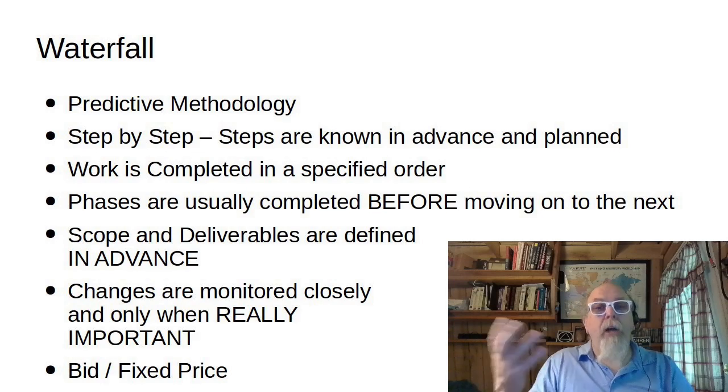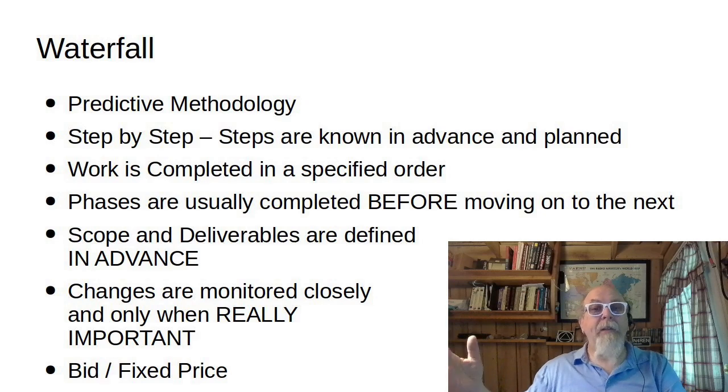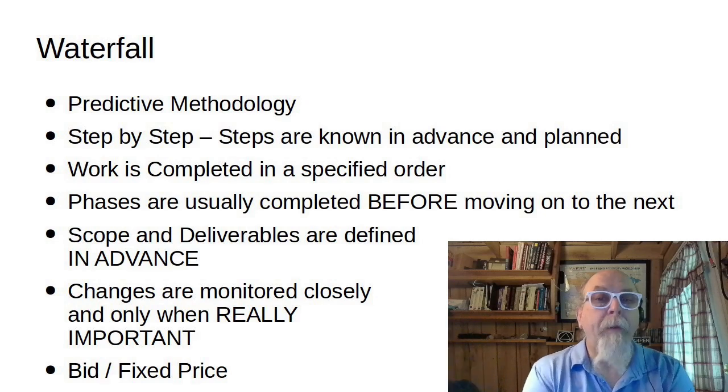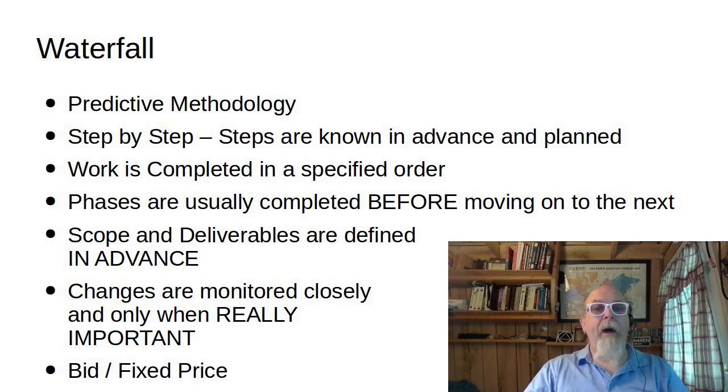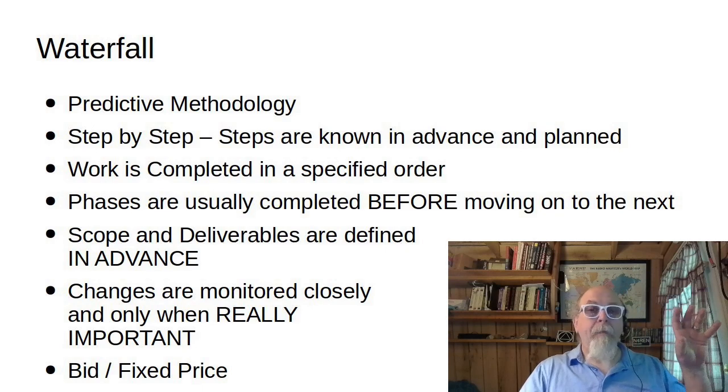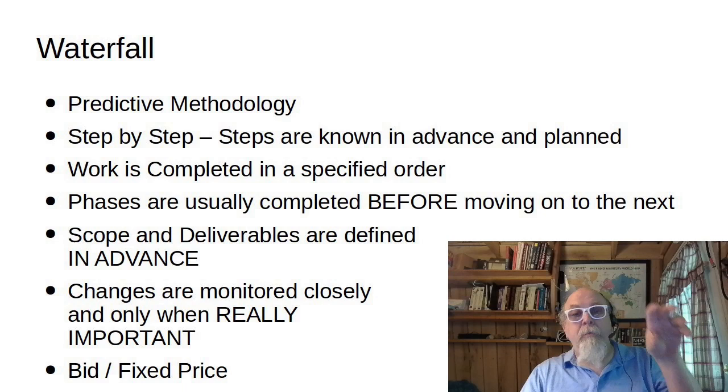So changes cost money to redo the plans and to make sure they don't mess with other parts of the waterfall methodology. Waterfall methodologies are great when you're doing bidding or fixed price, or you're going to have subcontractors do part and not other parts, because you can give the subcontractor the methodology, you can give them the list of work breakdowns, you can give them all of that, and they can complete that phase, and then we can get rid of that contractor and move on to the next phase.